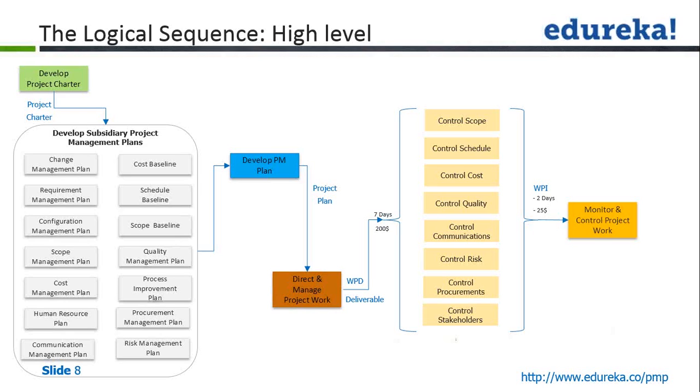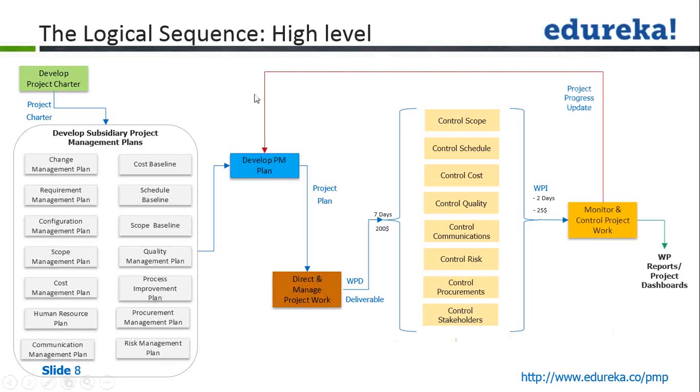A small subset of the project team, who is working on just one small module of the project, may see it as just a delay of 1 day. But when the project manager looks at the bigger picture, he will realize that this delay of 1 day is going to set the entire project off the schedule. It may have some severe consequences later on, and then the project manager and the team will have to take a decision on what is to be done.